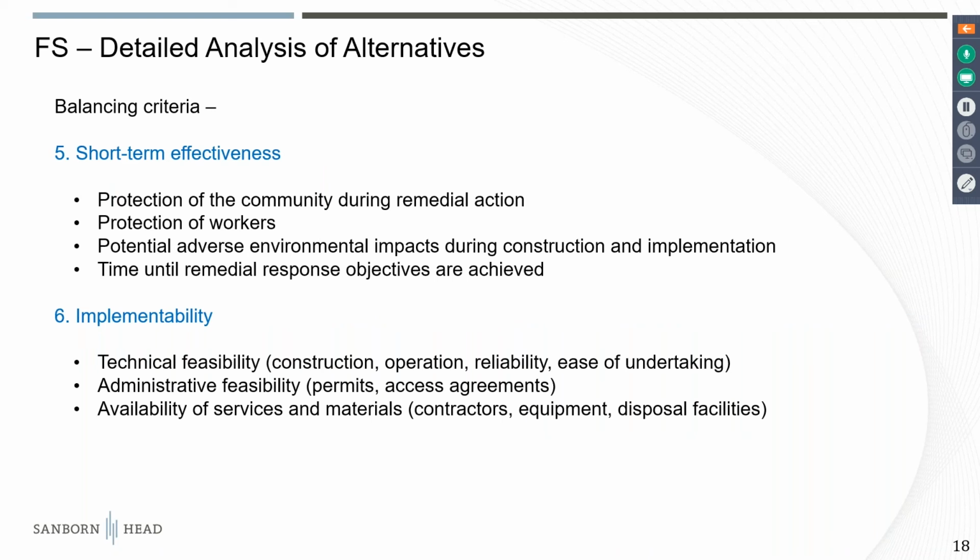And short-term effectiveness gets to how the community is going to be protected during the remedial action, how the workers are going to be protected, whether there's going to be any potential adverse effects just from the process of implementing the alternative. And implementability is organized into technical feasibility, administrative feasibility, and availability of services and materials. And technical feasibility gets to the ability to construct the alternative, its reliability, its ease of undertaking,